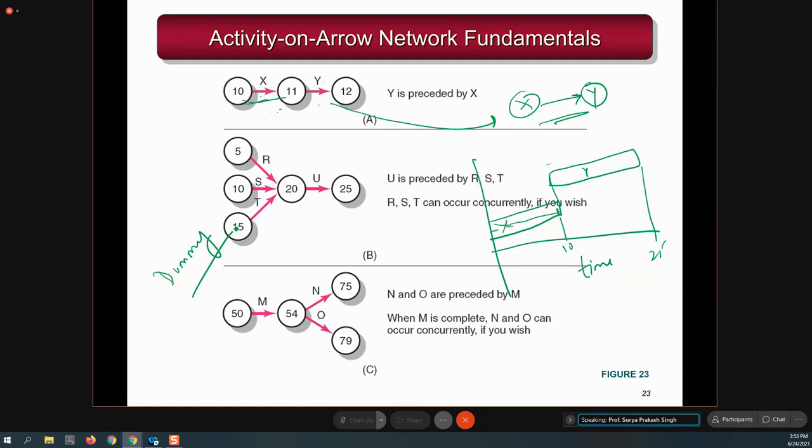While using the concept of activity on arrow, what happens sometimes, not always, is that the succeeding activity and preceding activity are not able to be connected to each other. So to make the connection proper and right, we may need to use dummy activities. But a dummy activity has no meaning, and we represent it using a hash line or dotted line.